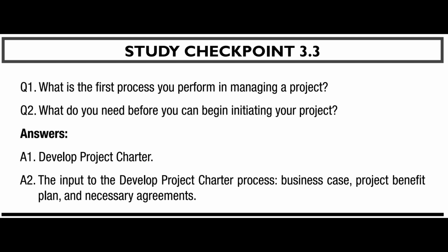Study checkpoint 3.3. Q1. What is the first process you perform in managing a project? Q2. What do you need before you can begin initiating your project? Answers. A1. Develop project charter. A2. The inputs to the develop project charter process: business case, project benefits plan, and necessary agreements.